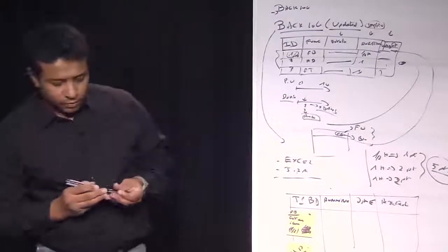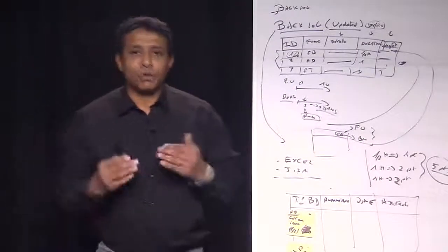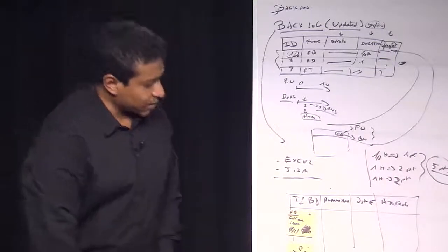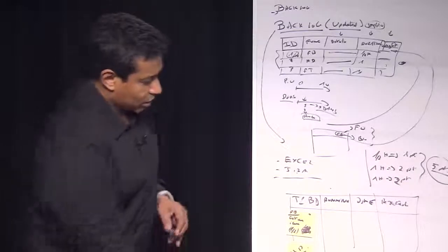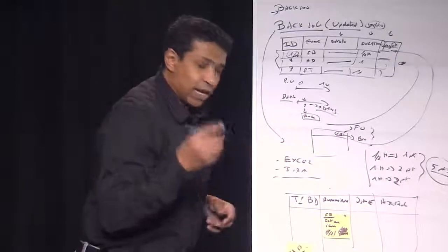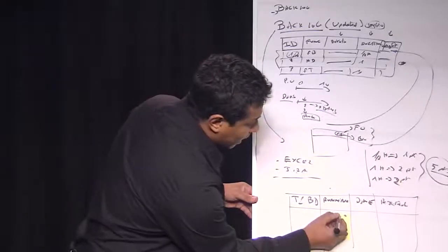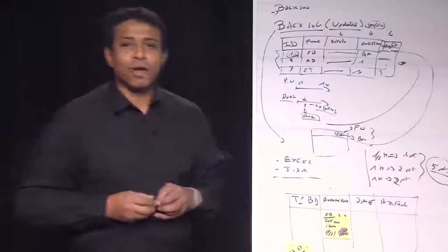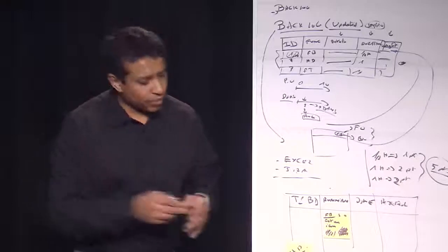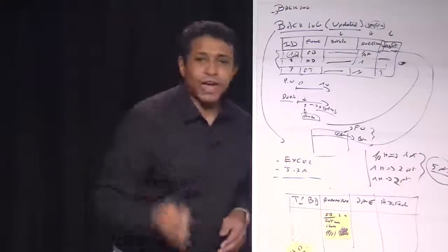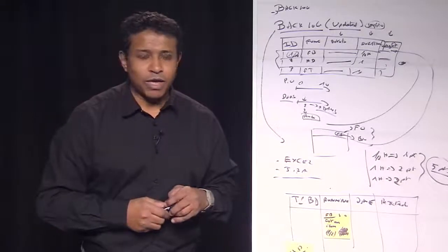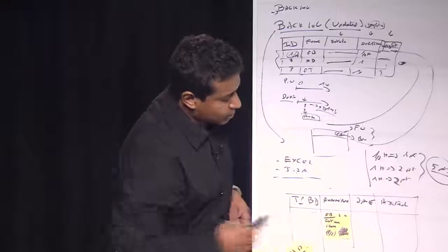What does it mean? It means that me, the developer, when I'm coming in the morning, I just look at this array, this board, and I say, okay, what's going to be done today? Oh, this is an emergency. So I take it and I put it on running because I've taken it. And if I want to be exactly precise, I put my name here so that the Scrum Master can know that, let's say, Charles just took this task and it's got to be done in half an hour. And he says, okay, I'm ready to do it in half an hour. I can do it in half an hour. So this is on running.